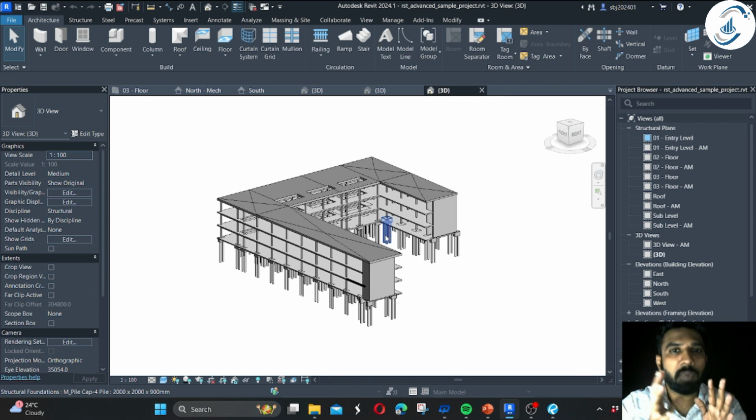So what we do is we produce our 3D models, and we have a meeting together. All the stakeholders, that is the architects, structural engineers, MEP contractors, all of them, they get on a meeting, and they check the whole 3D model, whether any services are clashing with each other or are not passing along appropriate locations. Okay. And these errors are spotted then and there itself, even before the construction is started.